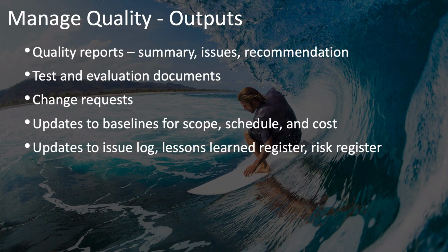The change requests are there because you may find that you need to make some changes in order to manage quality and improve things. If you have to make any changes to things that have been baselined, such as your scope, schedule, and cost baselines or your project management plans, then you'll need those change requests. And of course, you'll need to update your issue log with any quality issues that are discovered, and any risks that are identified go into the risk register, or any changes to those risks. And any lessons learned regarding managing quality should go into your lessons learned register.